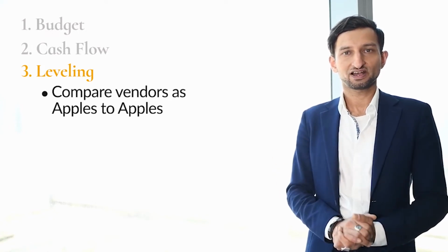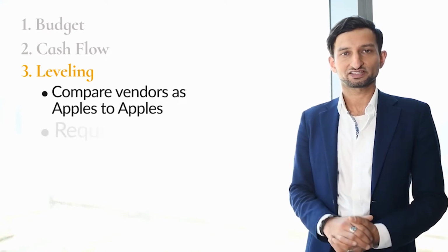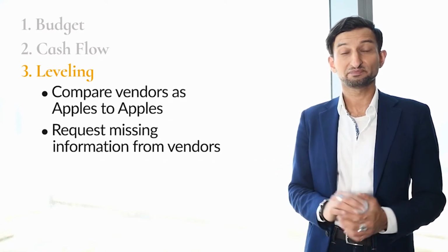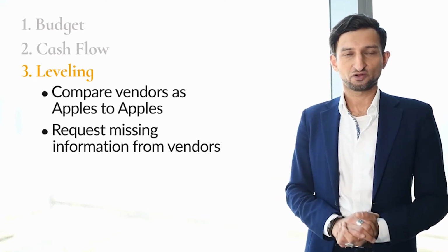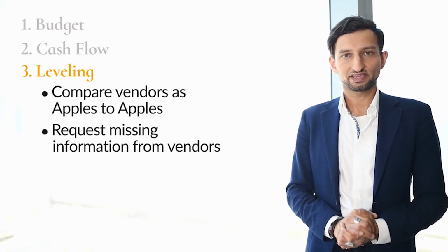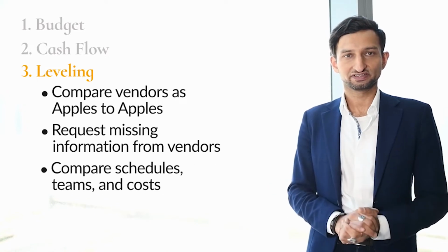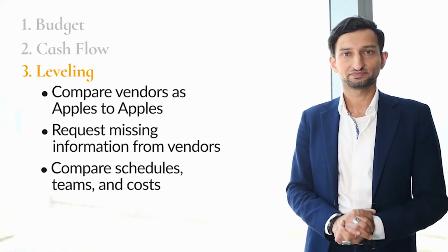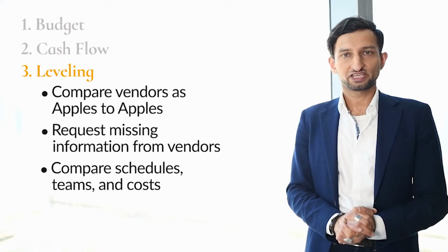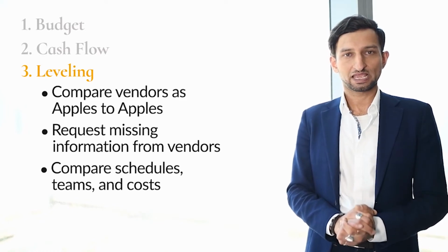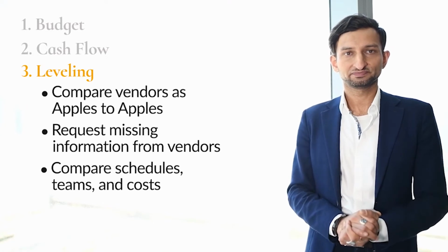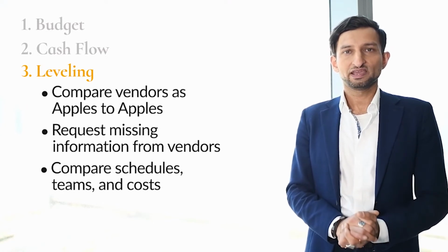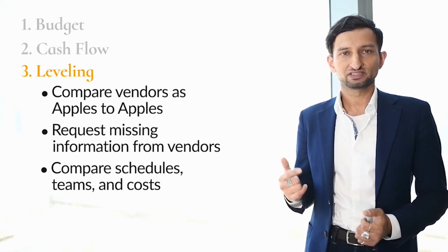First, compare the costs broken out in the proposal. If costs are not included by a vendor, and you must check each proposal carefully, you must also request this in the form of revised proposals. Next, be sure to compare the costs of the alternates if they're not included or if they are included. Also, compare the team and staffing to ensure that your team is capable and focused.